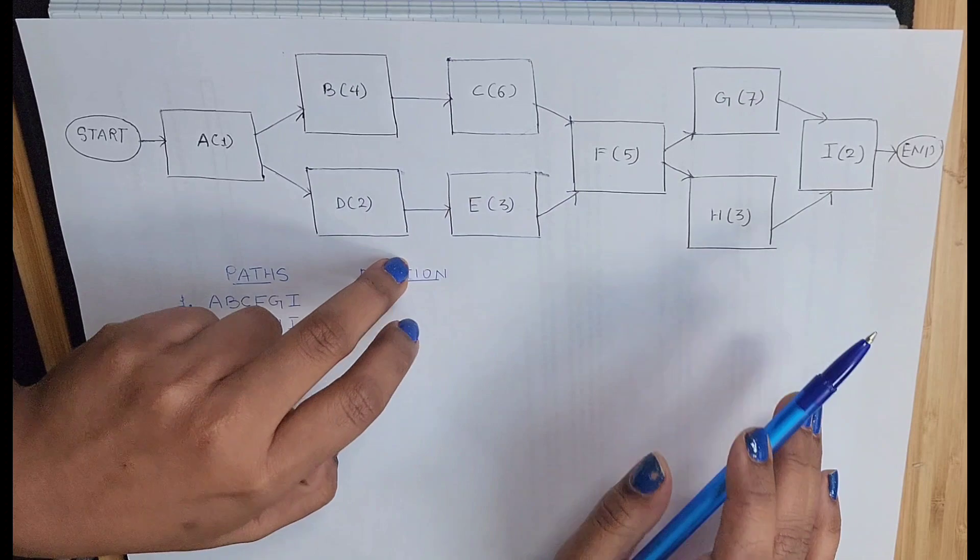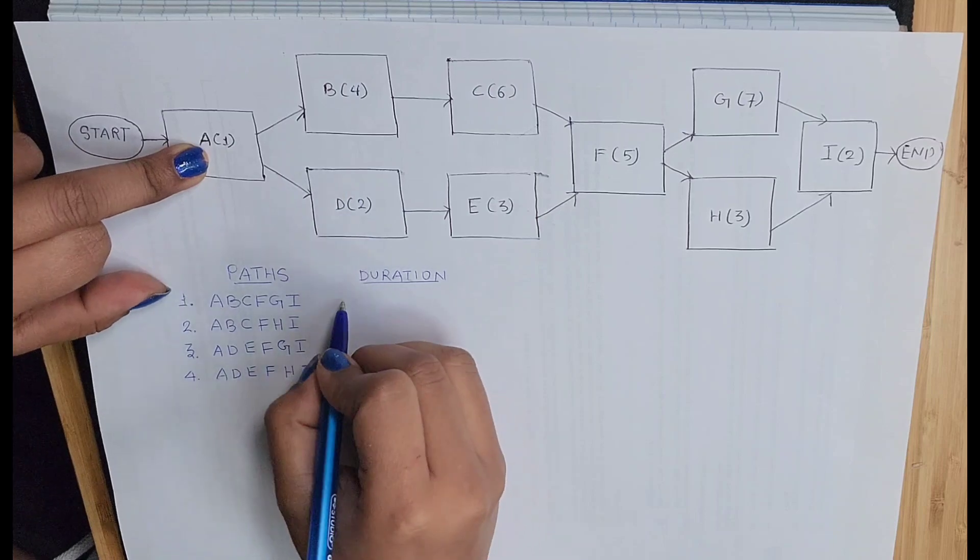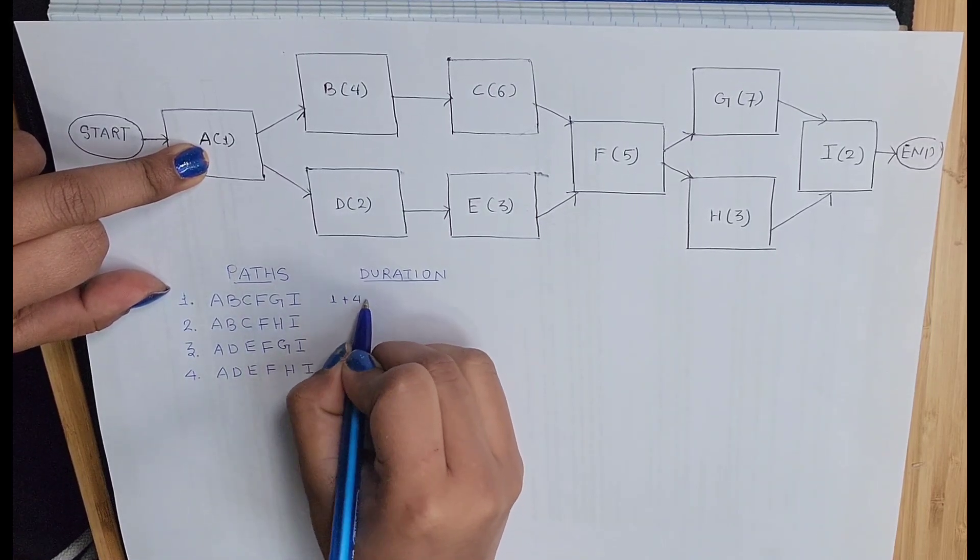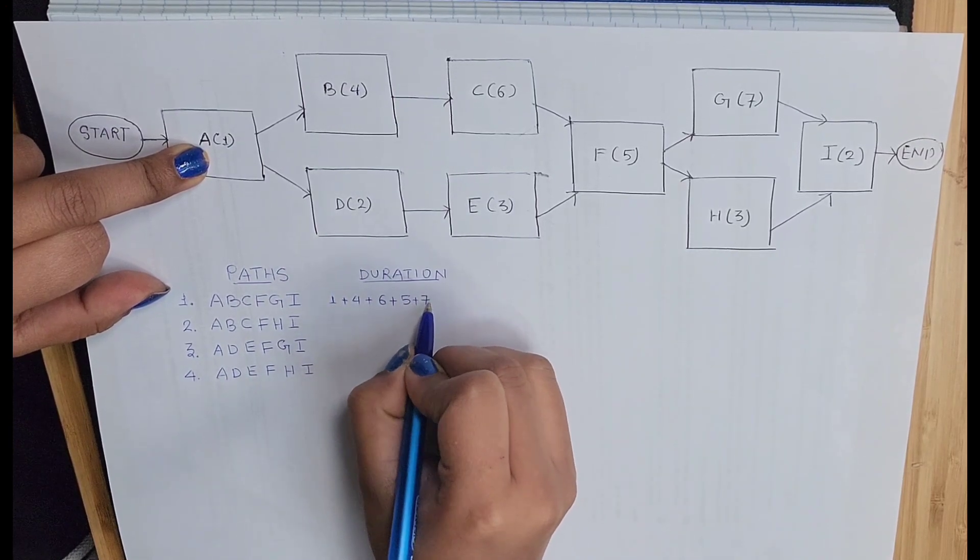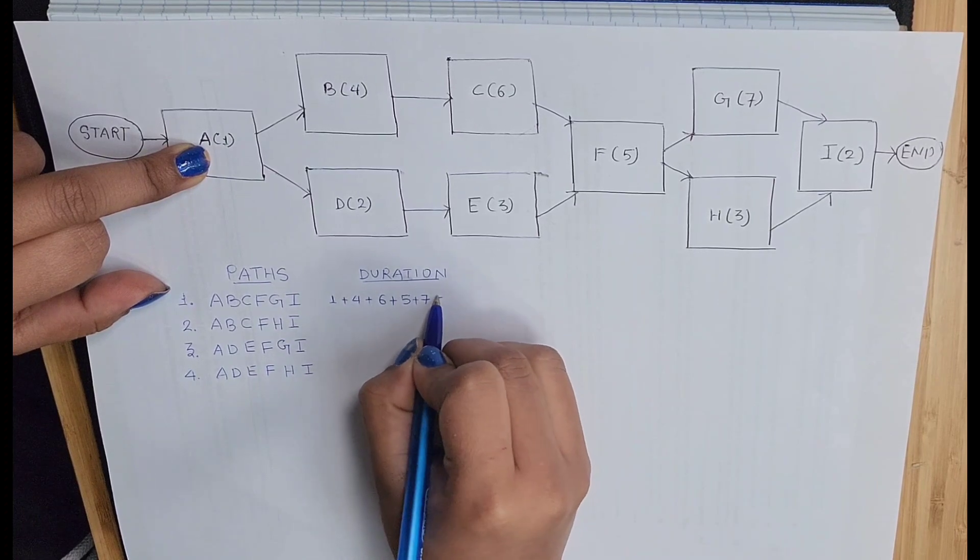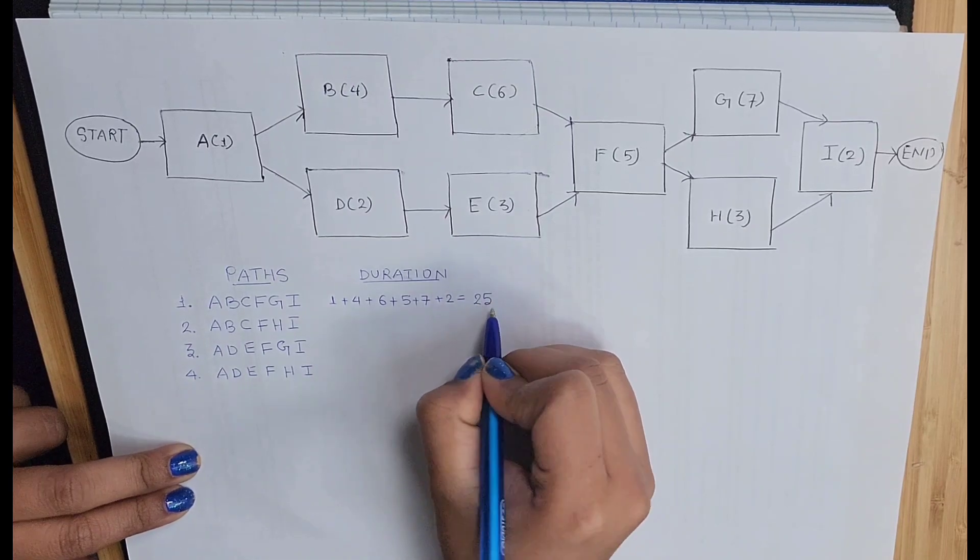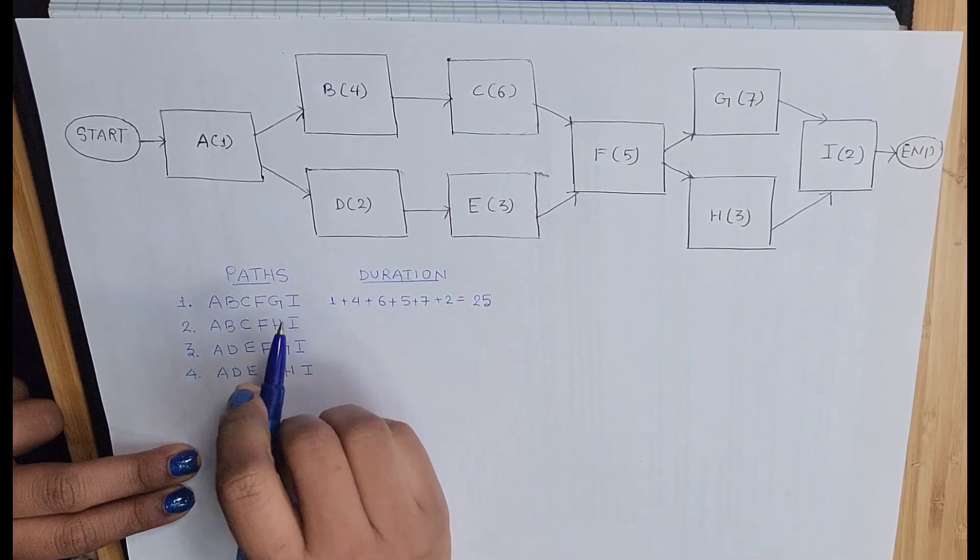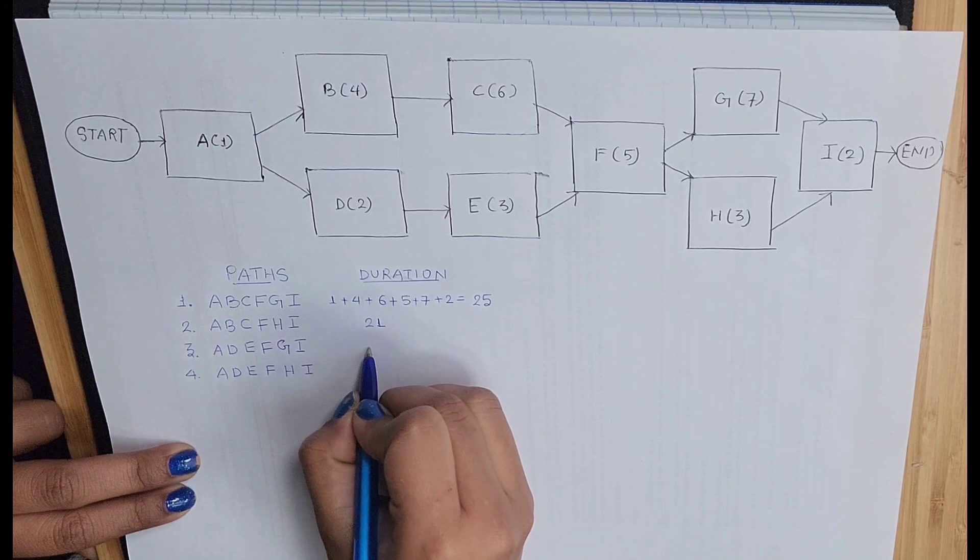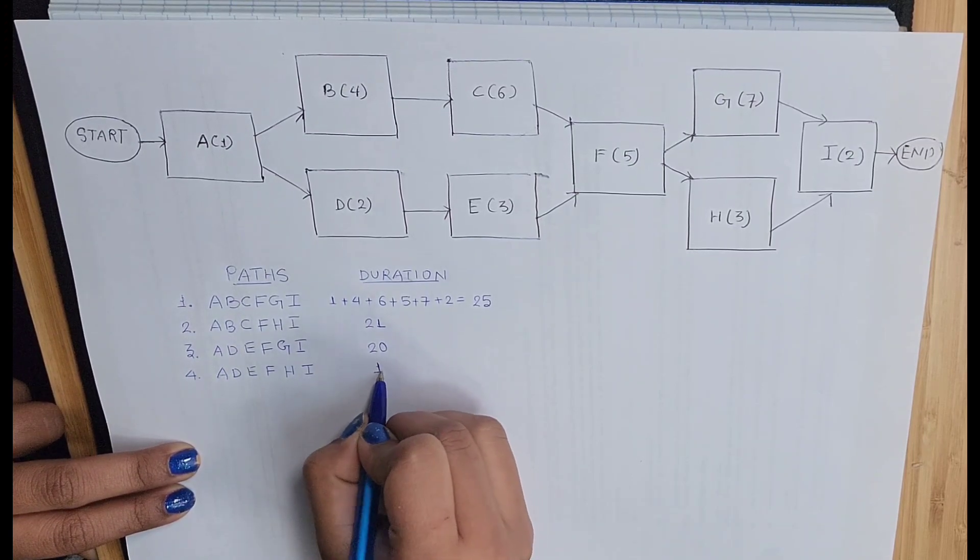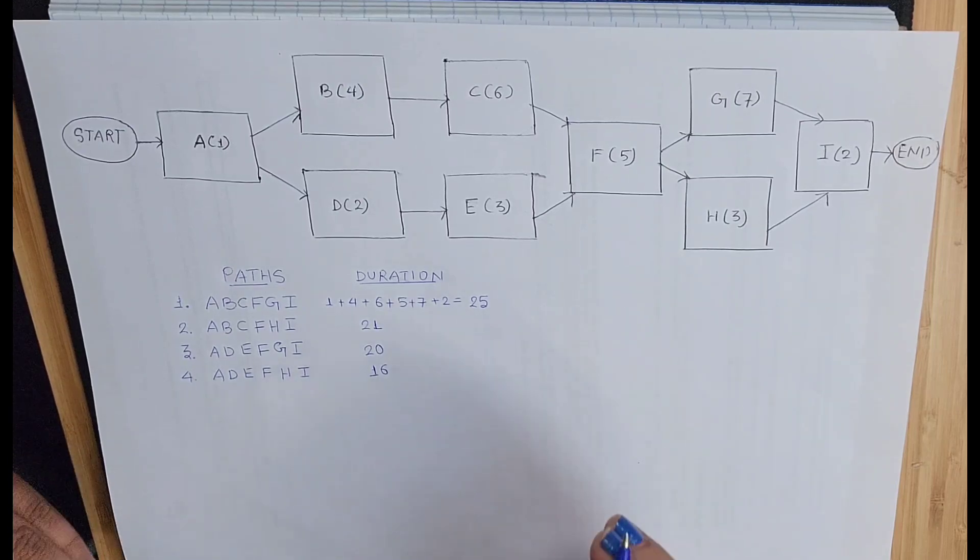To calculate the duration we just have to add the number of days each of this activity is taking to complete. So for this it's 1 plus 4 plus 6 plus 5 plus 7 plus 2, which will give you your duration as 25. Similarly, you will calculate for this part. It will come as 21, 20, and 16.